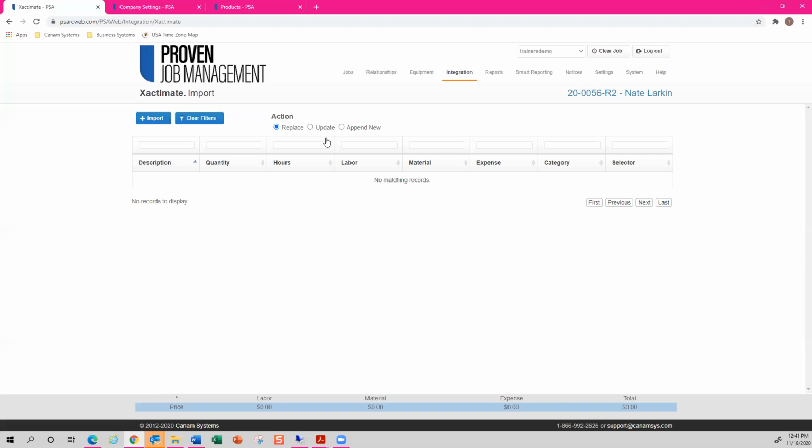I will export that estimate from Xactimate to come back into Proven Job Management. And when I select update, the system will look for those changed line items from the new estimate that we just sent over and update that information within the existing work orders.